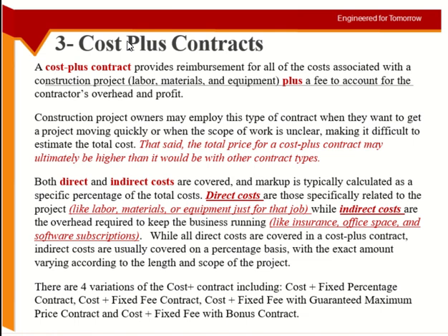So if his normal profit was 10%, here he may quote 15%. Got my point? And secondly, you will not go for this type of contract for any project, right? Those will be specialized projects that I want to push them, but I don't know what will happen in the end. So obviously these projects are high profile cases.